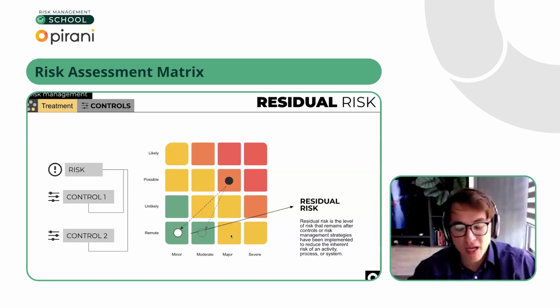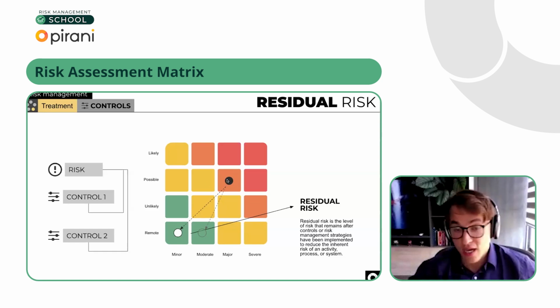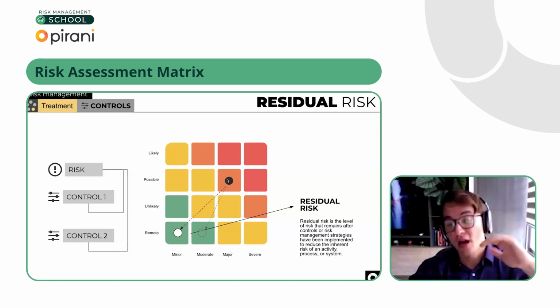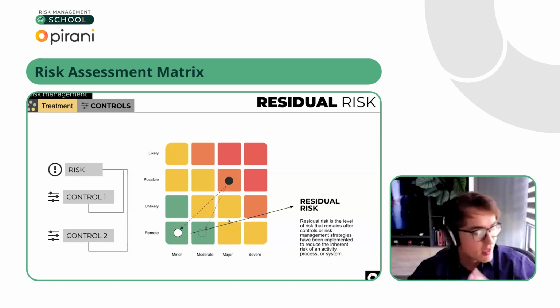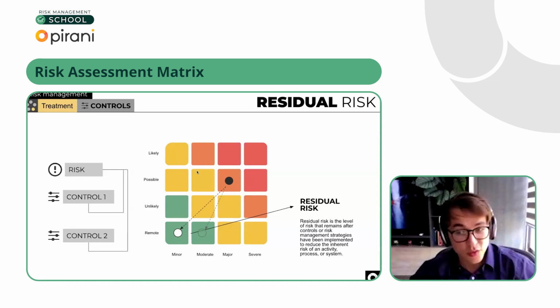Maybe the impact, if I do nothing, is orange, is high, but if I hire an insurance and create a contingency plan and an awareness campaign or whatever communication strategy I want to follow, I can reduce the impact. So from orange to yellow, maybe not the likelihood. I don't know if it is clear, like the concept of the risk assessment, because this is basically risk management.